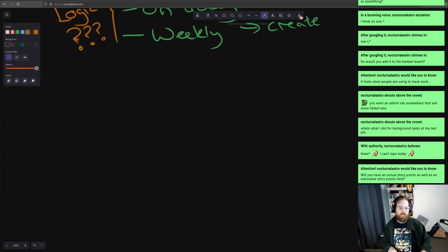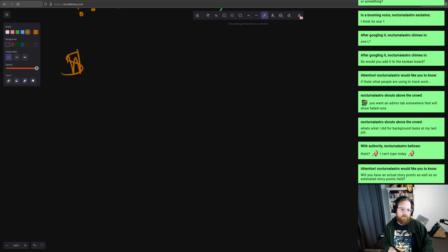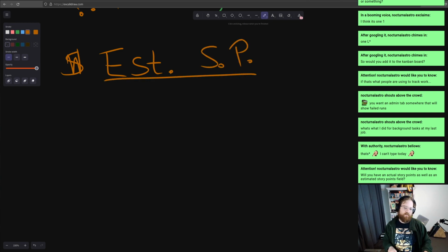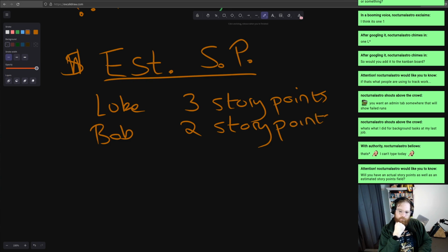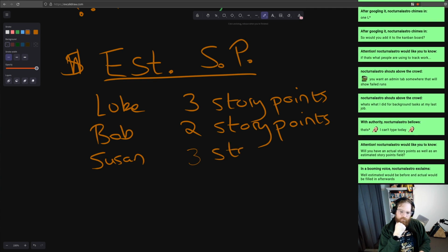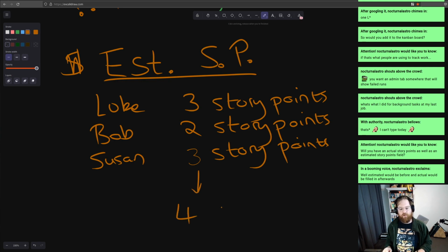So later on, what I would want is, let's say I have estimated story points. I'm just shorthanding this. Sorry about all the shorthands. Let's say I go, okay, cool, they'll take 3 story points. Bob will be like, nah, that's 2 story points. Someone else, Susan, will be like, nah, that's 3. And so forth like that. And then hopefully someone who's managing this will look at this and be like, all right, no, I'm actually going to put 4 story points.